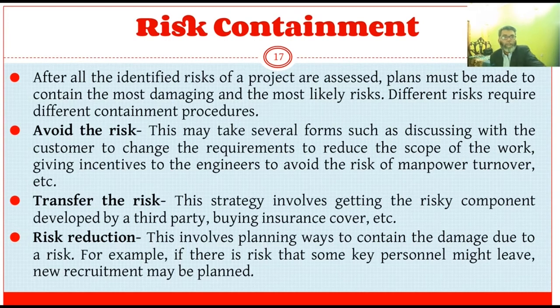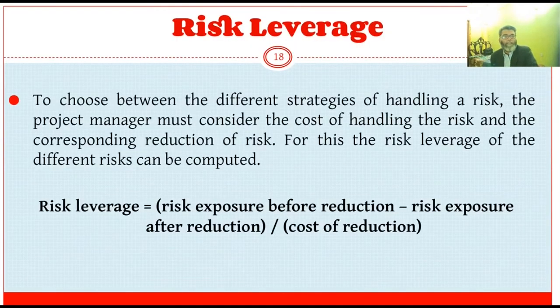Then comes risk leverage. To choose between the different strategies of handling a risk, the project manager must consider the cost of handling the risk and the corresponding reduction of risk. For this, the risk leverage of the different risks can be computed by the formula: risk leverage equals risk exposure before reduction minus risk exposure after reduction, divided by cost of reduction.